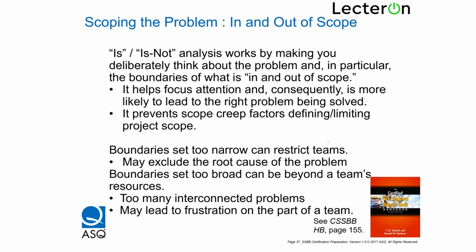Factors defining and limiting project scope: boundaries set too narrow can restrict teams and may exclude the root cause of the problem. Boundaries set too broad can be beyond the team's resources. Too many interconnected problems may lead to frustration on the part of the team.